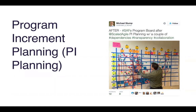Once each team has identified what they need to do to help achieve the features, they go and talk with product owners and developers from other teams to identify cross-team dependencies. The way those dependencies are communicated to the rest of the Agile Release Train is by using physical string to tie one issue to another on the board, representing that a dependency is taking place — as you can see in the image on the screen.